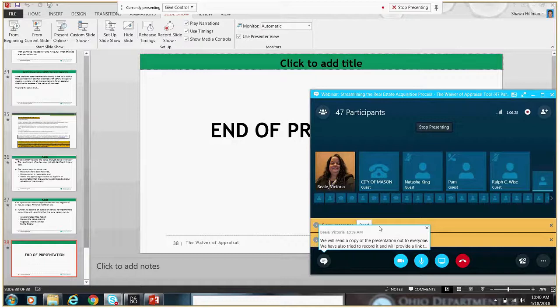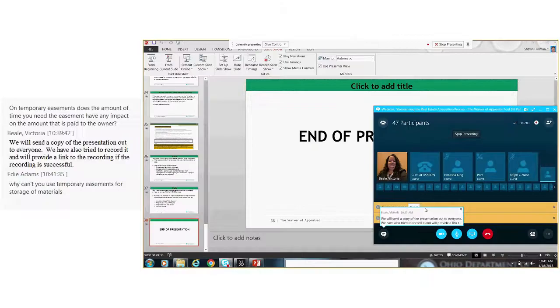So we estimate the unit value of the property, say $7,500 an acre. We multiply that by the area encumbered by the temporary, and that gives us the fee value of the land. We'll then multiply that by a capitalization rate appropriate for the land, 8%, 9%, 10%. It depends on the circumstances. That will give us the annualized income to the land, and then we multiply that by the duration of the temporary, and that's how we generally arrive at the rental amount for temporary construction easements. There are other ways, but that's typically what we see.